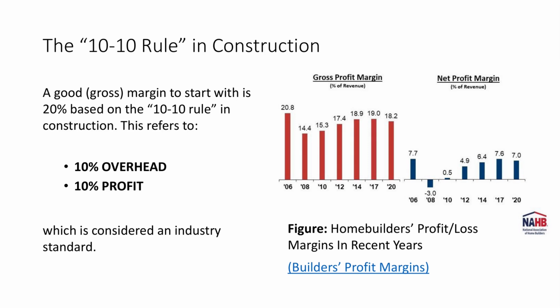When you hear about 30%, 25% profit margins from contractors or subcontractors, that refers to the gross number. It is not like the real final net profit margin as a percentage of the total revenue they have. The industry net profit margin is really around 3 to 6%, depending on the size of the company. If it's a very large company like Wallbridge, for example, they do 3% to 5%.